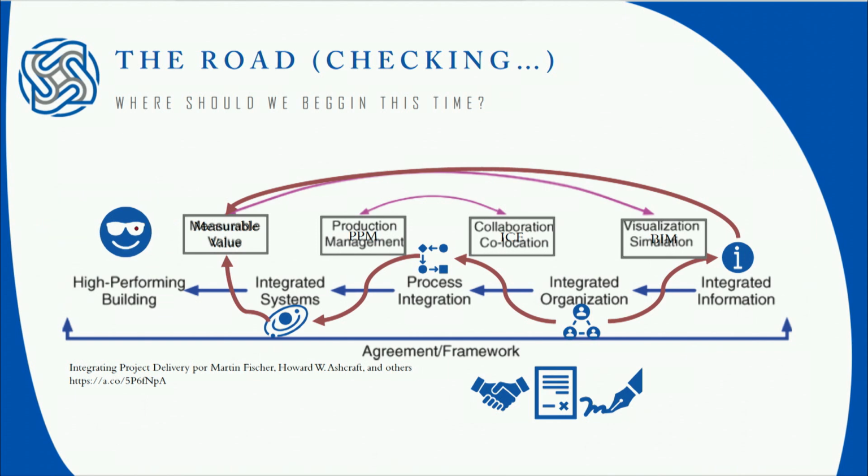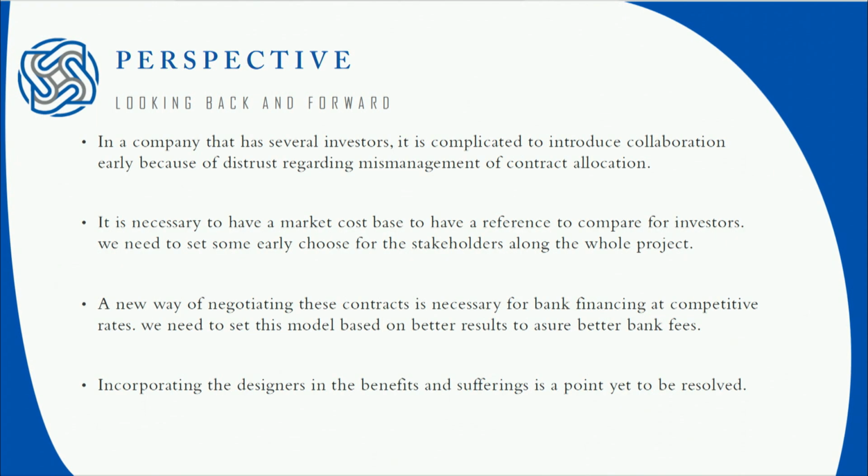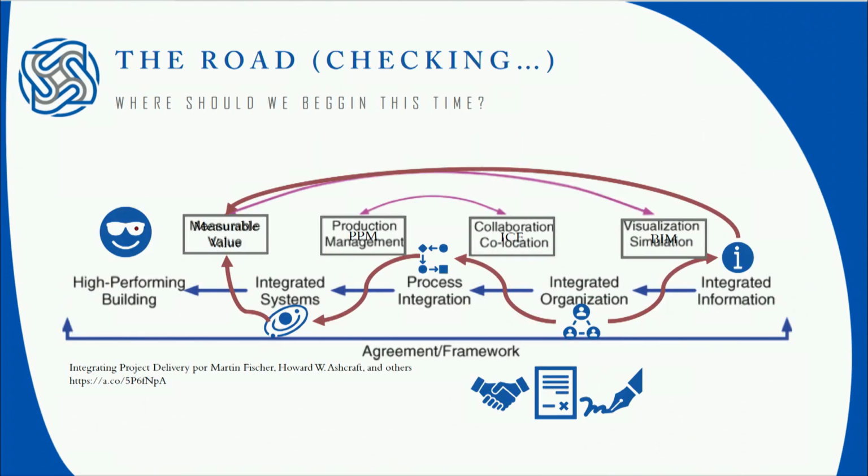And the results were exactly, okay, the animation is not here, but the results were that we managed to have 1.5 of reduction of capital expenditures. And 1.5 means that we actually have 3, because 1.5 was for them. We shared that. So our share was 1.5. And we managed to have 20% of opex reduced.